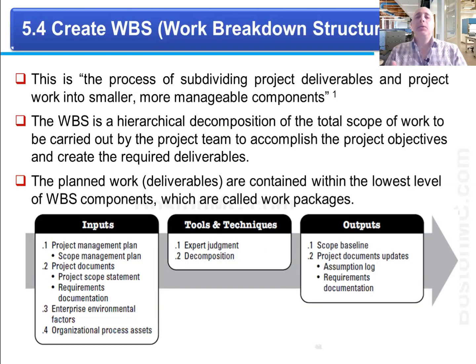Now, if you're doing it using software like Microsoft Project or Primavera or any other tool, then when you break it down into these smaller pieces, you can assign, now this is outside of the scope of PMP, each piece of these could be assigned authority to that specific team lead to make changes in it. And whenever there's a problem on the project, you can pinpoint where exactly the problem is happening by looking at which of these tasks or boxes on the WBS is lighting up as red, or depending what your software does.